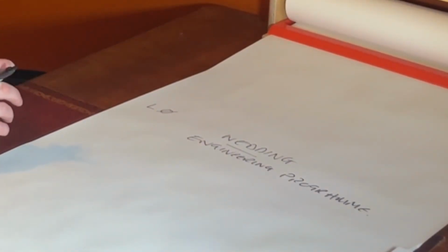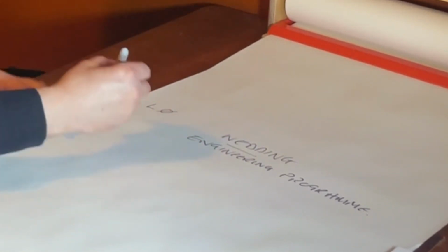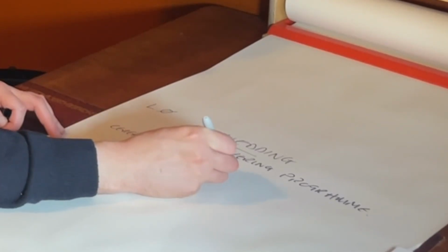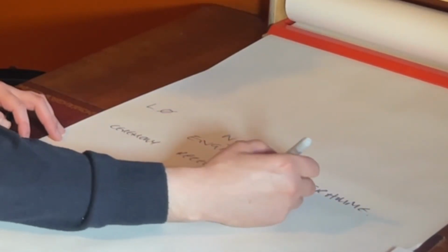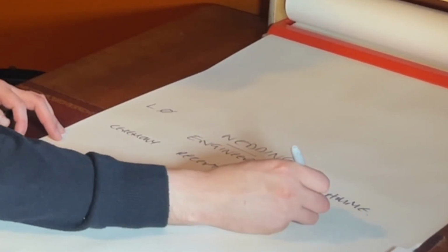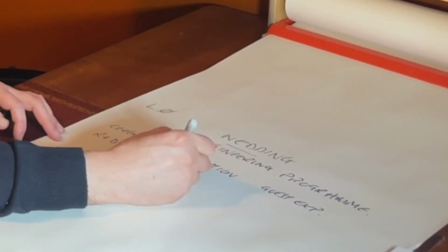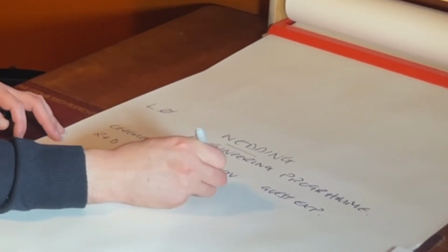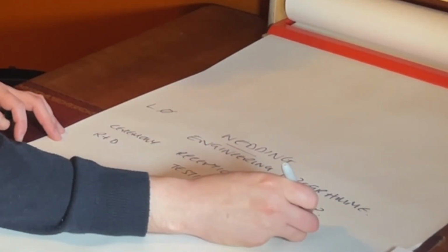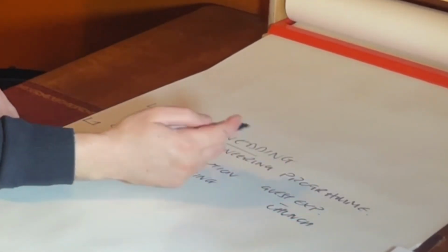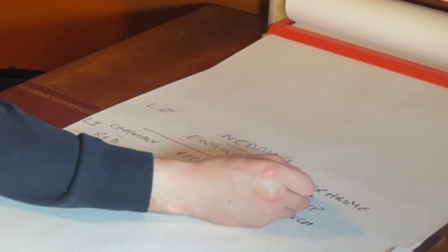Then ask yourself, what are the big chunks or big pieces of work that need to be done? So if it's a wedding, it could be the ceremony, could be the reception, it could be the guest experience. Similarly, with an engineering project, it could be the R&D, research and development, it could be the testing, it could be the launch. So this is level one, all the things that need to happen to make this work. You can even draw a little connecting line like that.